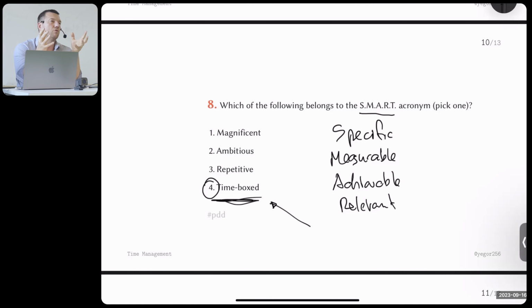30 minutes. But we use robots. We use computers for that, for automated management. But this is, in my opinion, fine-grained, top-level management. The programmer starts, makes an attempt. Something works, good. It doesn't work, we close the task. We start another one. So we switch between tasks very often, and we close tens of tasks every day, not just waiting for one task for a week. So the smaller task you can give to the programmer, the better management you are.